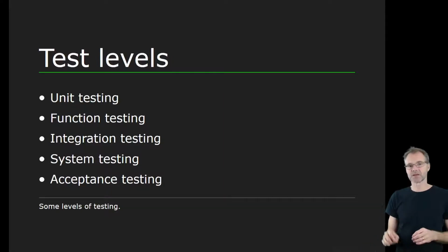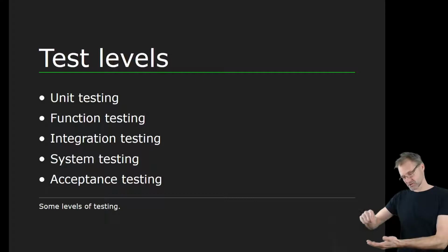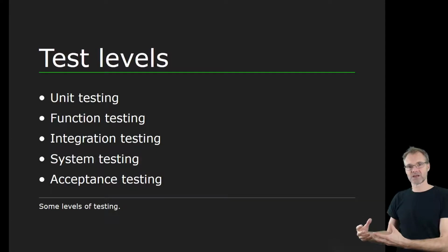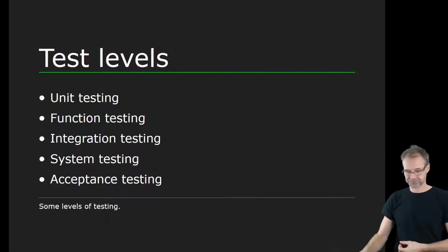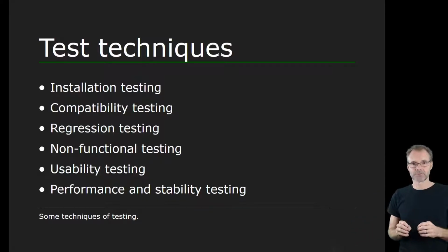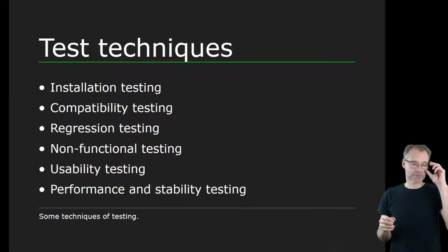Acceptance testing is perhaps the last thing that is done before delivering to the customer. Our company is doing acceptance testing with the customer, and the customer is signing off, okay, the product is acceptable, it is working according to the requirements. So it's a very important step, because when we have done acceptance testing, we usually can send the last invoice to the customer. So different levels of testing, done at different times of the project or product development.